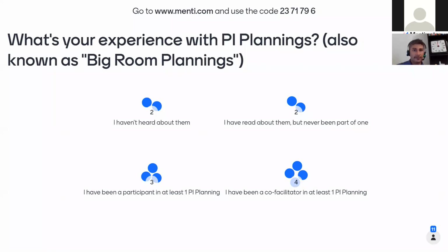It's an event that comes from the SAFe framework, and that invites the teams to stop their work and start thinking about planning, not a sprint planning, but a set of sprints, up to 4, 5, 6 sprints. If we accommodate this per year, it will be per quarter, so we'll be doing this exercise 4 times per year.